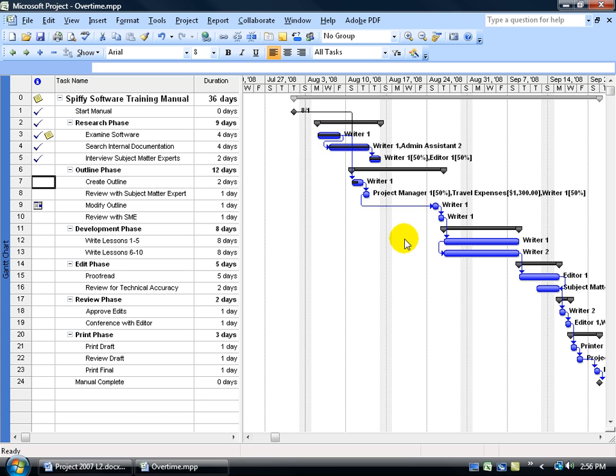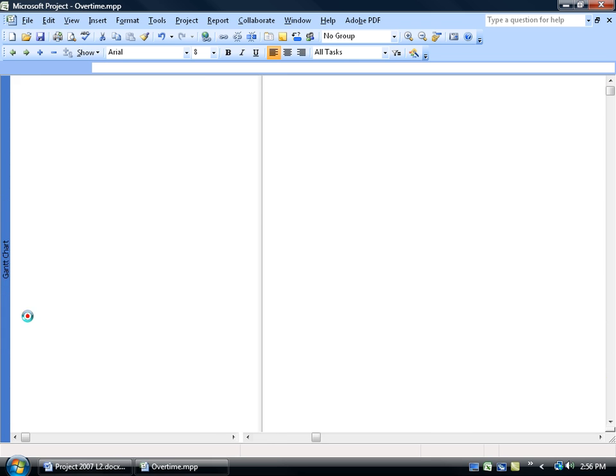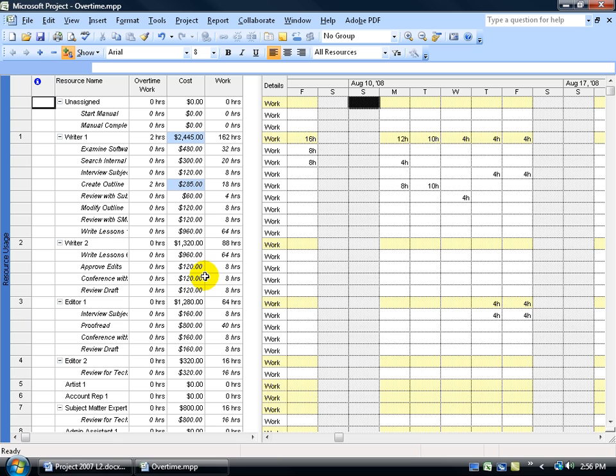But then again, what project has ever gone perfect? You won't be flagged for these, except for your over allocated resources, which won't be flagged if you've marked them complete already, as we just learned over here in the resource usage view. Rider 1, the reason why it's not over allocated is because he completed this task, and this task has yet to be completed creating the outline.